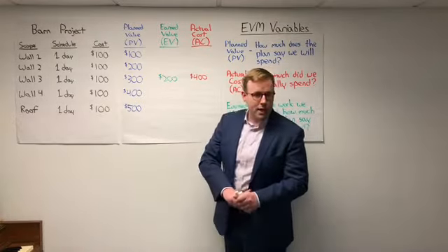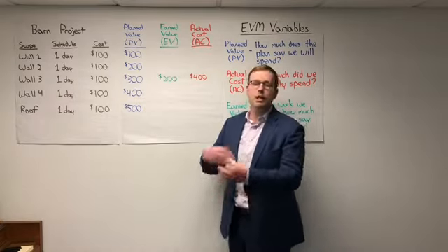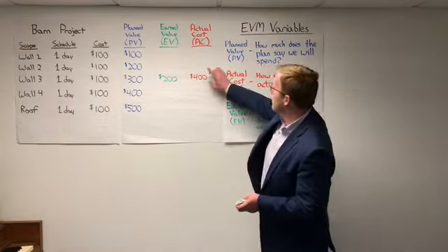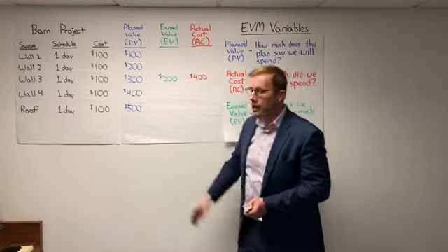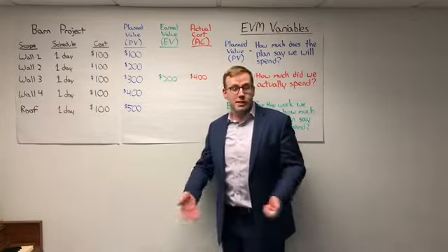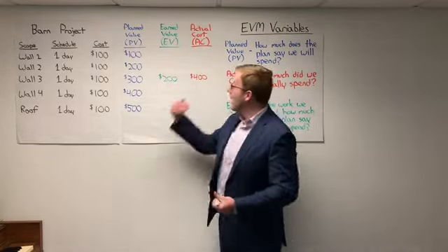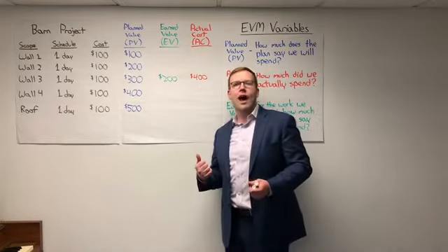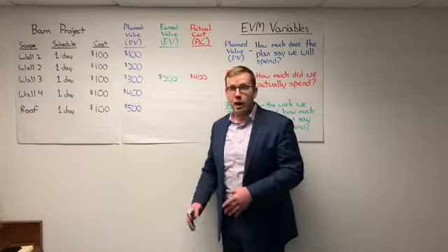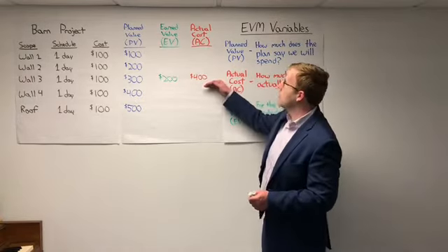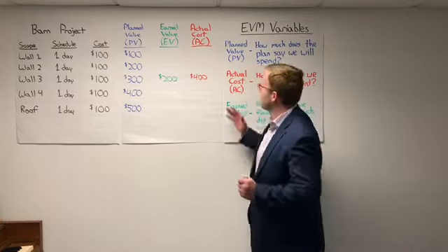Because it takes that amount of time for invoices to get processed. It takes that amount of time for timesheets to get approved and processed. So we might not have real-time visibility into the actual costs, right? Team members, this is why our bosses, this is why our project managers are always hounding us for the actual real-time data on our spend and on our schedule. It's because, yes, they're going to see it when the invoices roll in a month from now, but they need to be able to report on it today. So I said that was an aside. Let's get ourselves back in here.